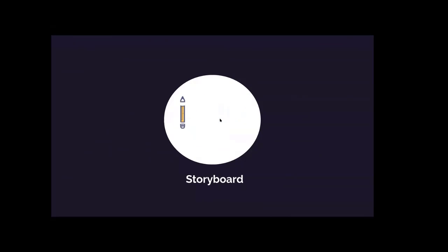So now we have the content and the flow. Now we have how it's all going to be written and how it's all going to be communicated. We have the visual style. And before you even get into developing, creating just even a really quick either text storyboard or just understanding how the visual treatment and the text is all going to come together, spending a little bit of this time up front will save you a lot of time, especially if you're looking at higher levels of effort. If it's animated video or virtual reality, whatever it is, you want to kind of do it in these thumbnails, just so it's a lot easier to collect that feedback and change that feedback without burning the budget.